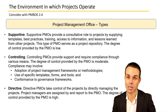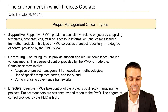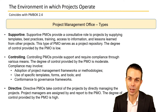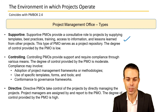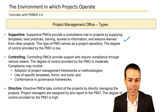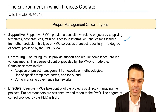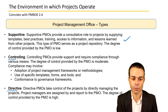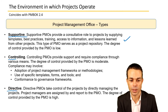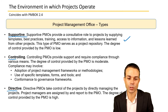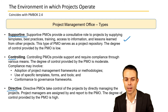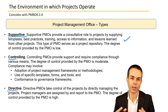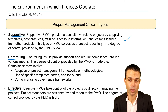The PMO, or project management office, comes in a few different types. Starting with the supportive PMO — it's more of a consultative role. They supply templates and best practices but don't really have a high degree of control.